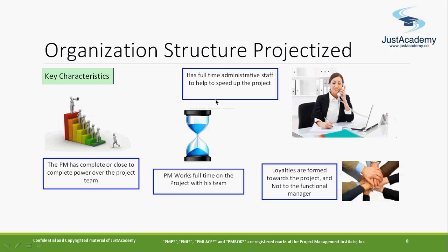You find that some administrative staff will be working on a project to support, like some HR or some people who work full time on a project, or sometimes partially. But if it is a big project, like an engineering project, an oil exploration project, or building a factory for a client, you'll find a specific HR department, one or two HR people working permanently for that project. You find one or two finance people handling it. If it is a small project, the administrative staff are shared with multiple projects.